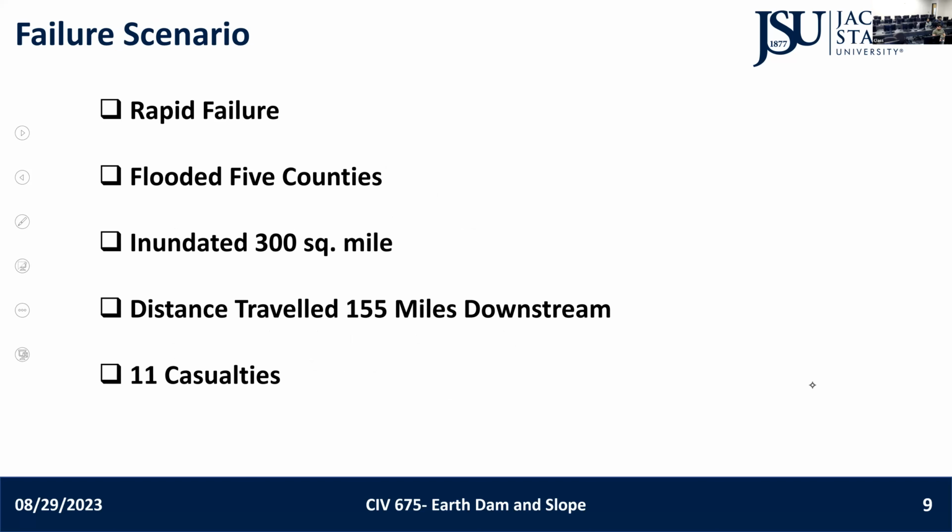Overall, when the dam was constructed, the budget was $250 million, but within 6 months after this failure, 40% of the budget went out. There were claims of around $400 million, and they provided around $140 million. The government repaid them. After this failure, an investigation team came and investigated the whole scenario. The investigation and failure procedure will be covered by my fellow classmate Said.